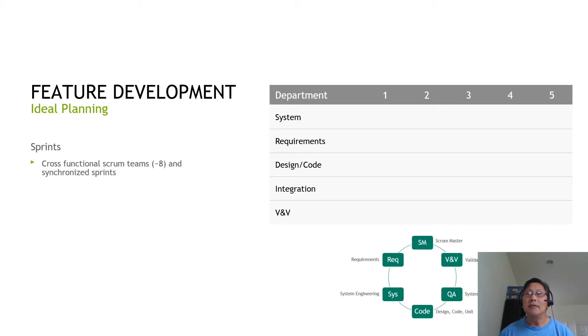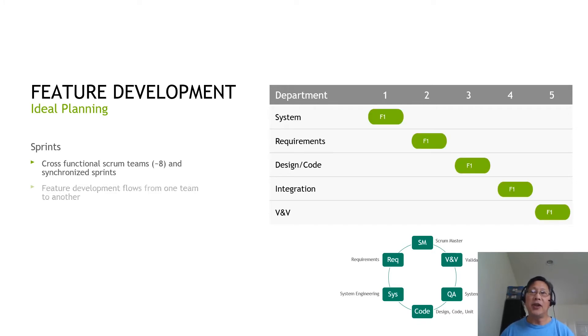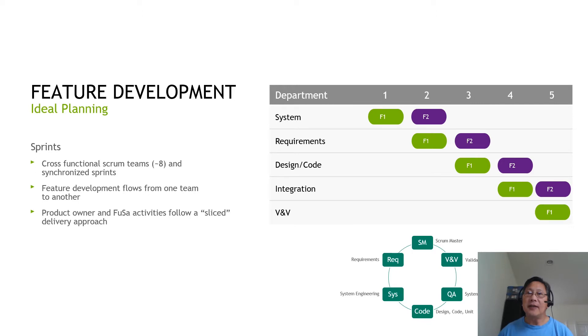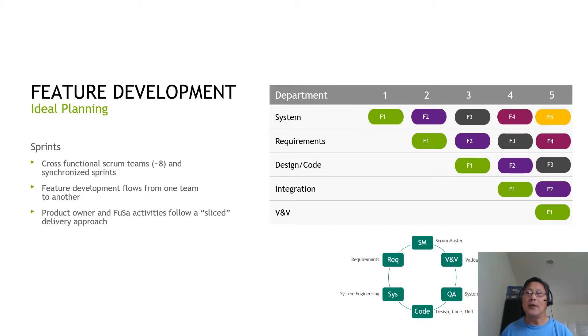Let's examine software development using Scrum. An ideal planning should typically include sprints with cross-functional Scrum teams of about eight people each, with synchronized sprints. Feature development flows from one team to the other. Each product owner's activities follow a slice delivery model, where a piece of a feature moves through system requirements, design, integration, and V&V — giving you feature slices F1, F2, F3, F4, and F5 over time.